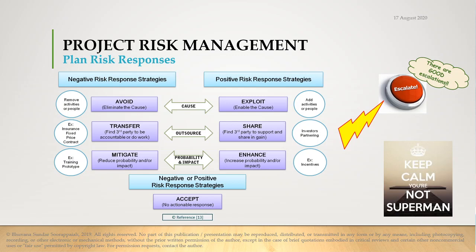But sometimes you will not give too much attention to it until the 6th or 7th month comes, right? So technically that risk will not be in a risk register but rather in a watch list with some triggers. What is a trigger? Suddenly in the 4th month, 1 month after speaking to you, she starts taking quite a lot of medical leaves. That's a trigger. Now you see, maybe she will go on leave a little earlier than the 7th month. So you move it from your watch list into your main risk register a little earlier.